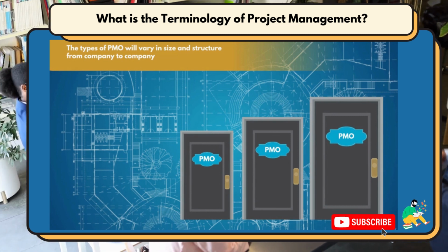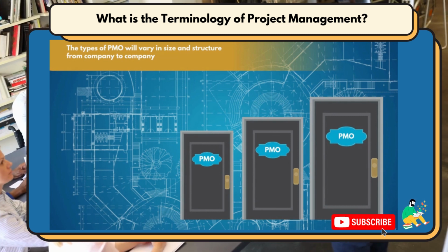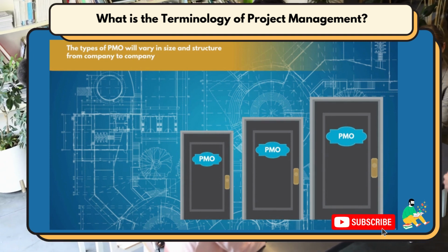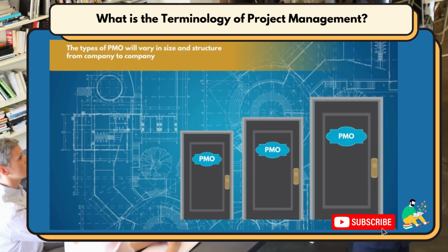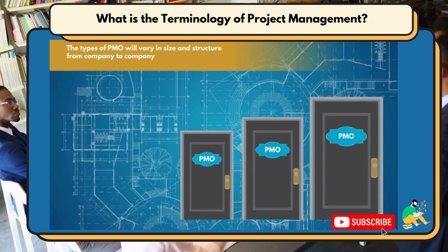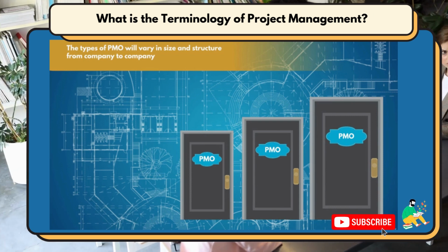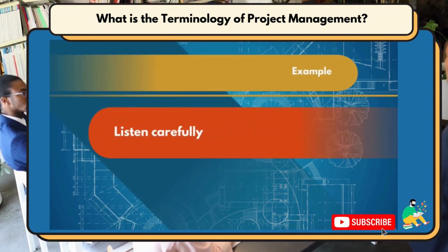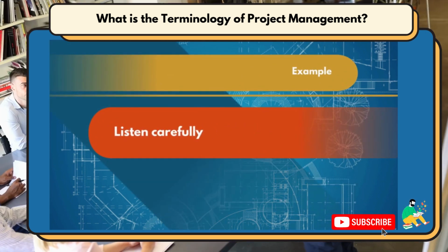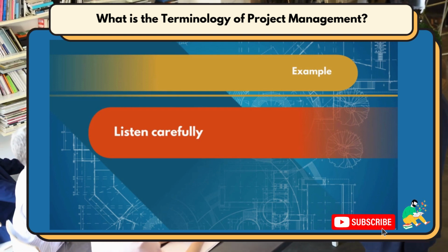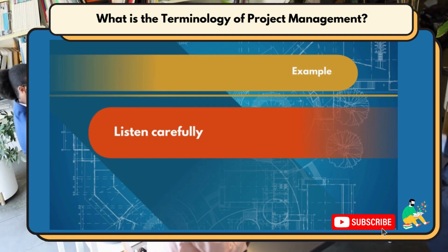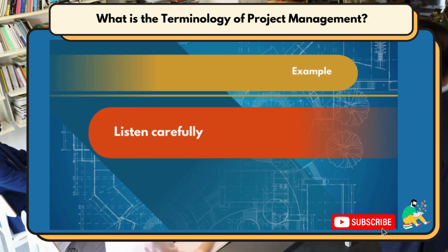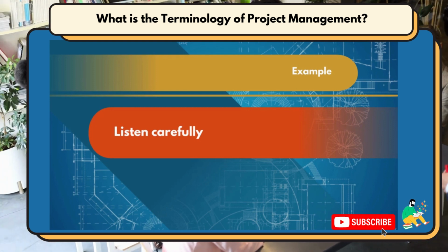It's usually the organizations that are more dynamic and changing which require a PMO to govern project work. Companies that work predominantly with projects are structured in a way they can easily form teams to execute projects, while industrial companies rarely need to maintain a significant PMO unit. For example, consulting companies are organized almost entirely as a PMO. They need to be able to easily form project teams that are working for different clients. On the other hand, an industrial company producing steel, for example, will have well-standardized operations and would not need to maintain a PMO unit.